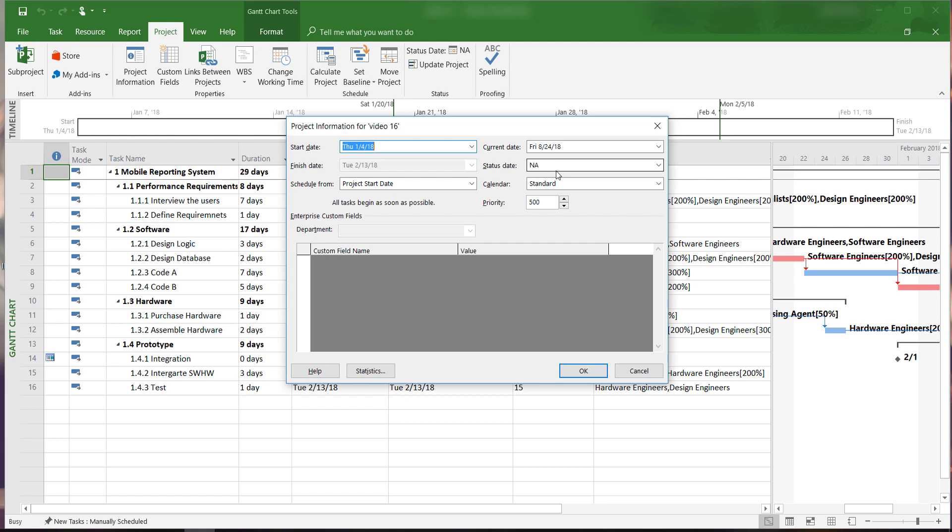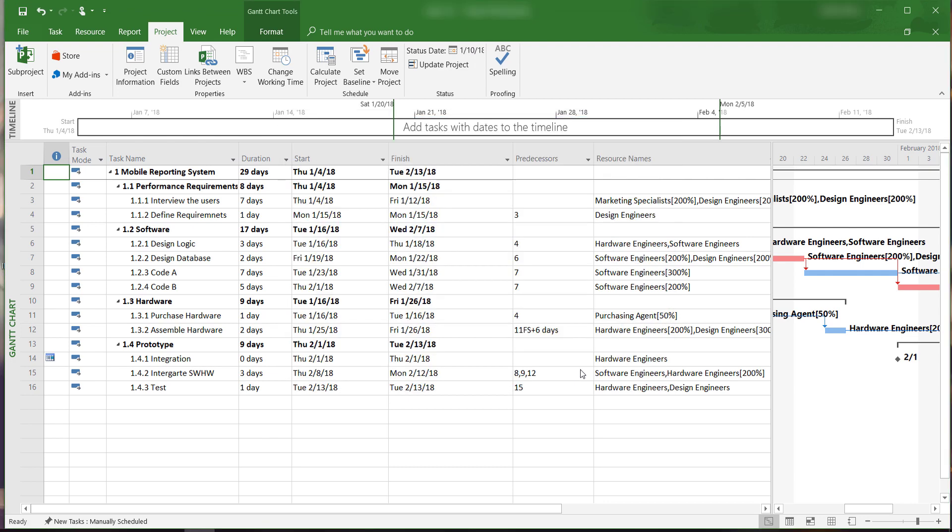If the project is underway and we want to evaluate the progress as of January 10, 2018, we can create a status report for that date and click OK.